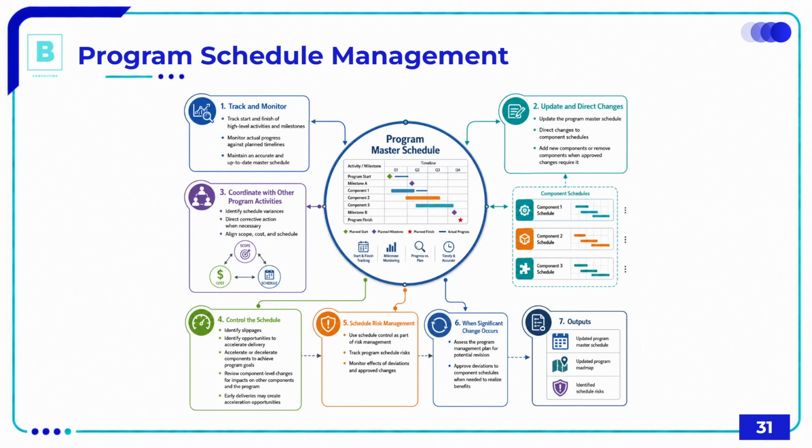Then also, adapt to changes: in case of changes, the program master schedule should always be updated. Also, check the changes and their impact on component schedules. And in case there are any changes coming from the component itself, the master schedule should also be updated in case that change impacts the other components.